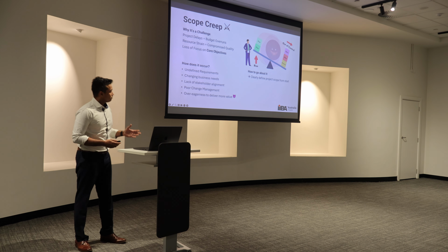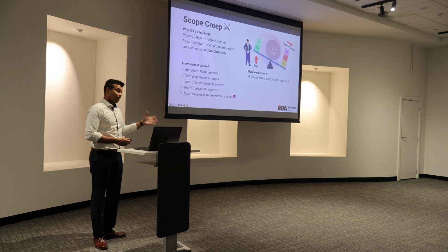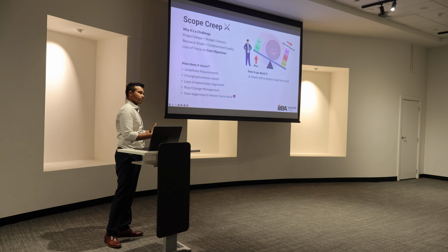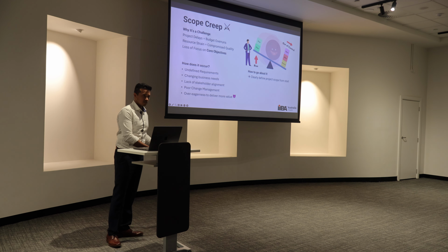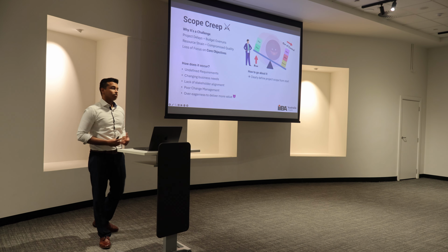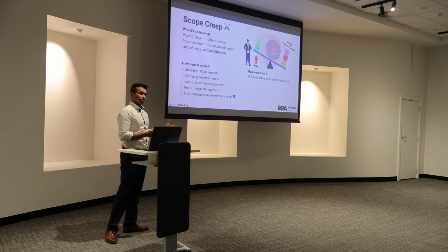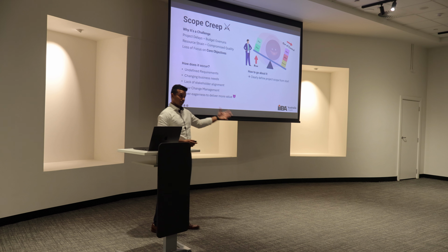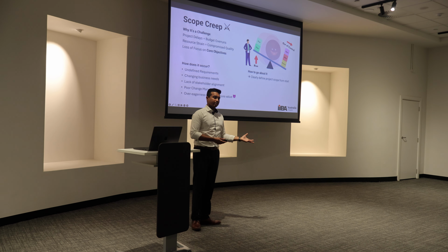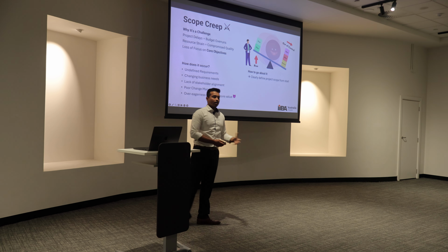What worked for me is, and this was a bit of a bold move, I thought I lost my job. I asked the project manager, if you don't have the time to have clear requirements, would you have time for change requests or would you have budget for change requests? Immediately gave me the chance to write the requirements, but that doesn't mean if you get that chance, you spend all day, all night redefining the requirements. If you're mid-project, you probably need to refine the requirements in a way that it's not misinterpreted by a developer so that they don't build the wrong thing, and move on.